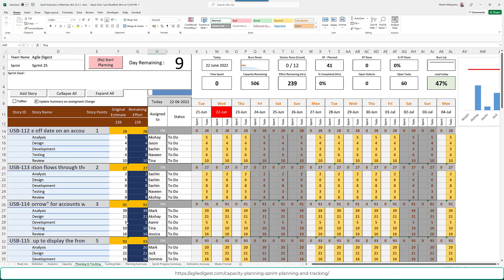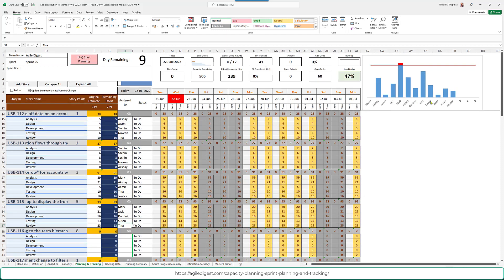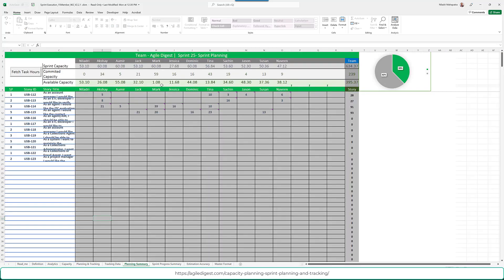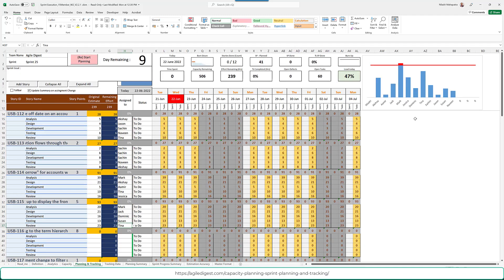Four stories have been updated to demonstrate the sprint planning process — identifying who has how much work and enabling better capacity allocation. A chart shows who has how much allocated; Mark is shown as slightly over-occupied. In the Tracking Data tab, Mark's load ratio is 1.08, indicating over-allocation. The system shows how much capacity each person had at planning time versus how much remains as of today.